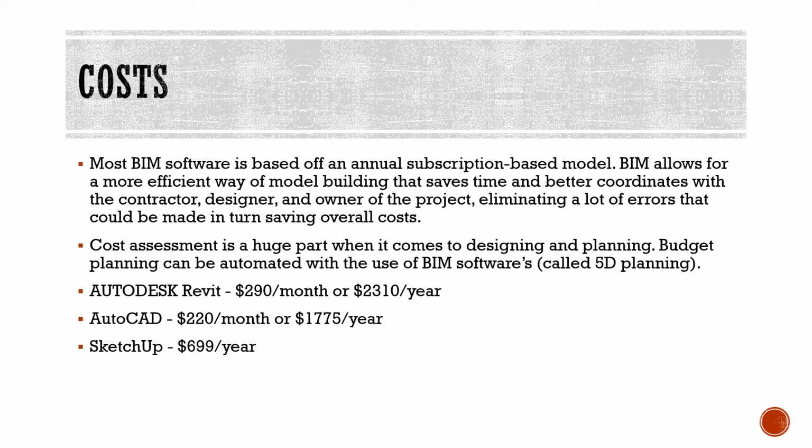Cost assessment is a huge part when it comes to designing and planning. There's this thing called 5D planning. Budget planning is automated with that. It's a great tool that BIM has allowed us to utilize. It allows for faster decision-making processes and improved collaboration among stakeholders. You can make real-time changes to quantity takeoffs, and it gives you accurate cost estimation and forecasting of what is going to be spent on the project to eliminate any unnecessary costs, which of course raises the profit of a project.